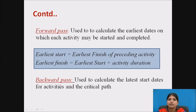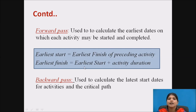The forward pass is used to calculate the earliest start and the earliest finish date. The earliest start date is calculated as the earliest finish of the preceding activity. Earliest start plus activity duration gives the earliest finish date.